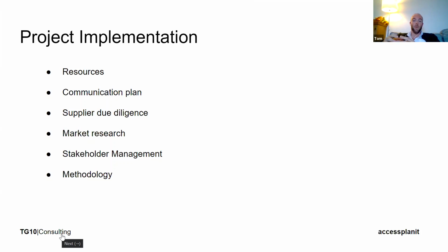rather than getting a number of supplier people to that point and trying to solution these things before you've got the requirements. Sometimes people jump out to speak to suppliers thinking they can shortcut that process, and often that just adds time on the back end of the project. So it's making sure they've got the right skill set and capabilities to meet those requirements that you've drawn together beforehand. And market research ties into that.